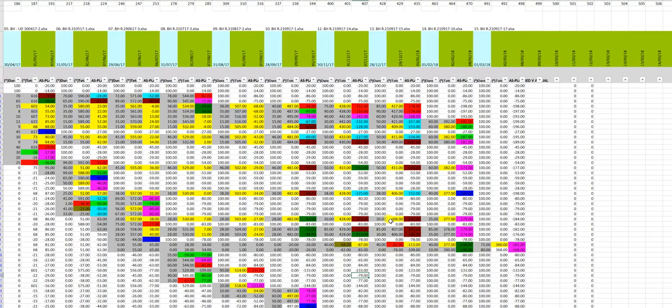Why is this? This is because it hasn't been corrected at the data-date line, or even if it has been corrected, the logic and the intent of the as-planned theoretical statement has not been followed in the actual sequence followed. We therefore have two divergent critical paths, one the as-built, the as-planned, and one the dynamic critical path.